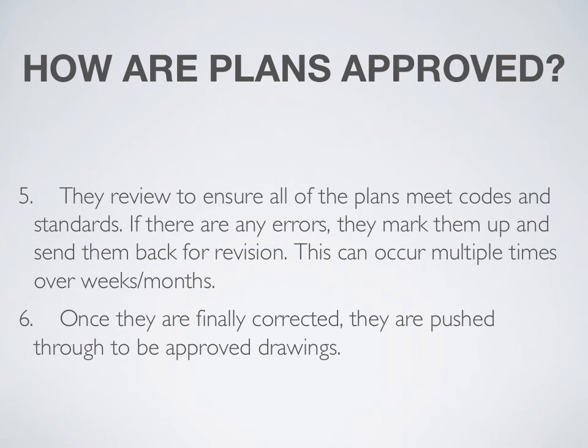They then review to ensure all the plans meet codes and standards. If there are any errors, they mark them up and send them back for revision. And this can occur multiple times over weeks and even months. Once they are finally corrected, they are pushed through to be approved drawings.